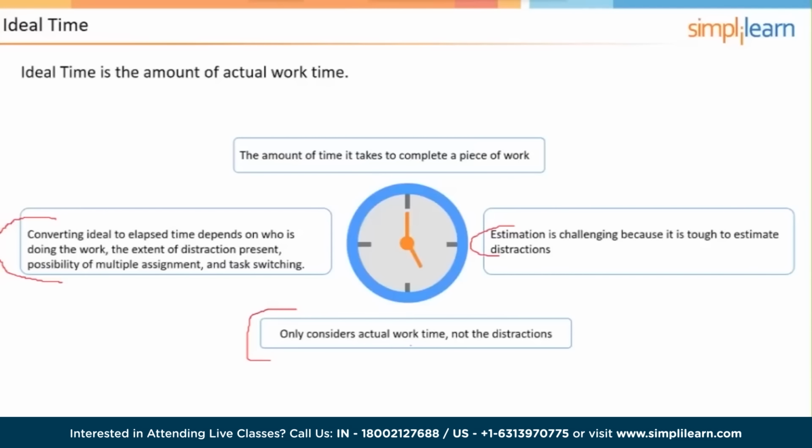When we're estimating in ideal time, we don't add a special amount of time that we would call a buffer. We just allow for the distractions and the interruptions, which could look like a buffer, right? You're saying, Priyanka, if based on your duties in the organization and our workday of 8 hours, you're typically available to be doing your project work 5 out of those 8 hours. So when we are converting ideal time to elapsed time, we will be building in extra time based on distractions and interruptions. We would not call it a buffer, but that's essentially what we're doing.